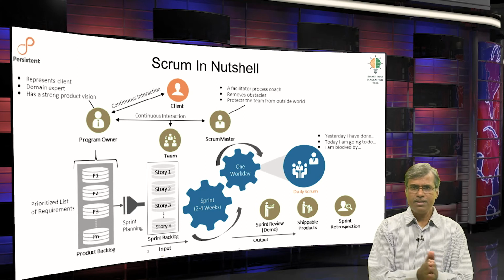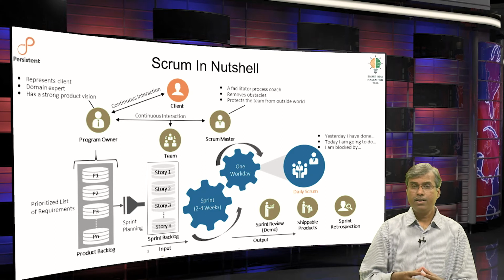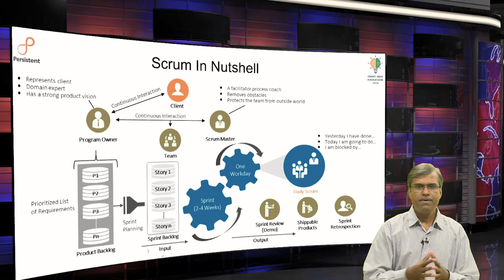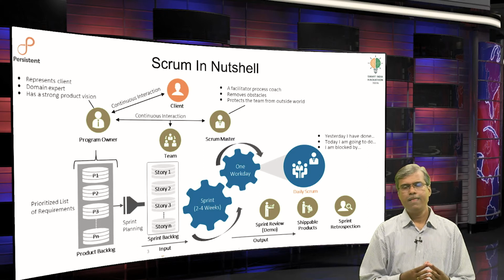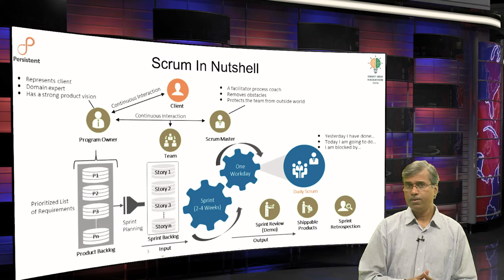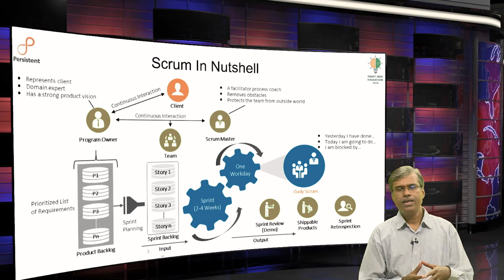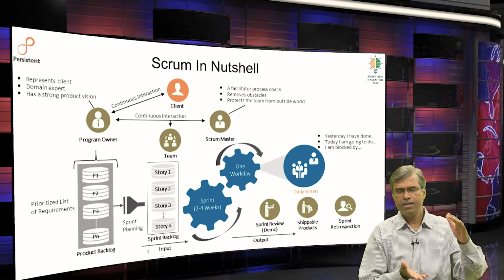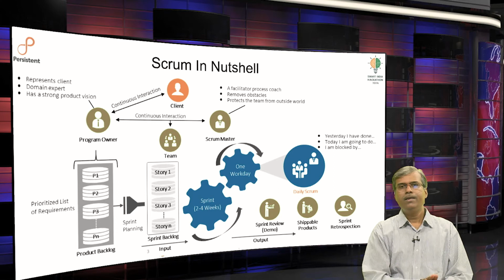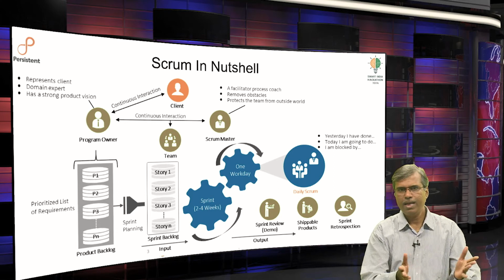So, essentially sizing is an important activity where every team member gets an opportunity to say how complex the story is, and whether the story needs to be broken down further or not. Once the stories are sized, the team would then know the total complexity of the backlog, because now you have a complexity for every story, you can easily aggregate for the stories that are in a backlog.